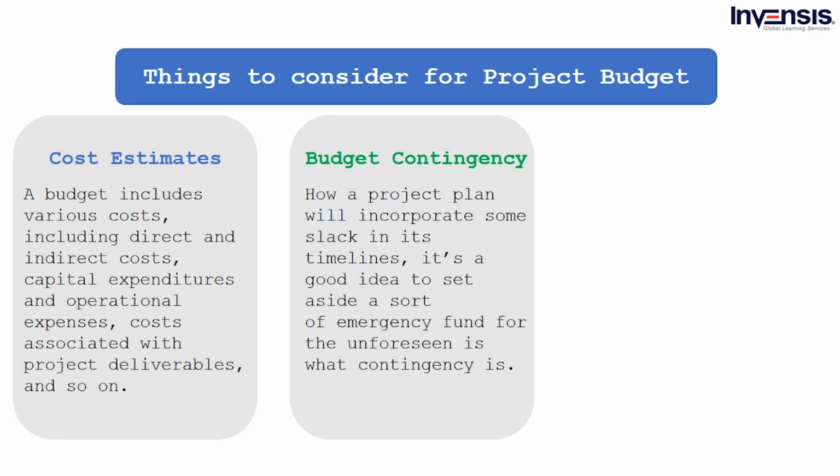It's difficult to estimate because it's money for the unknown. Those who must sign off on the budget will perceive it as inflated if it is too great. Setting aside 10% of the entire budget for contingencies is a solid rule of thumb. The project benefits by coming in under budget if you finish the project with little need to draw into the contingency reserve.